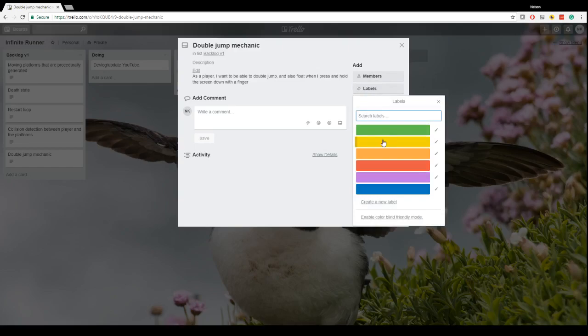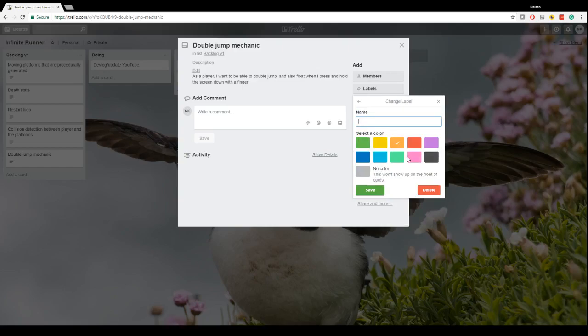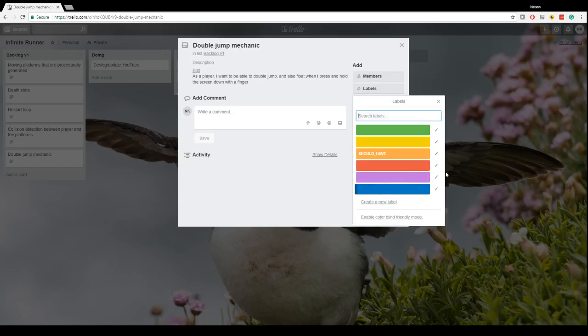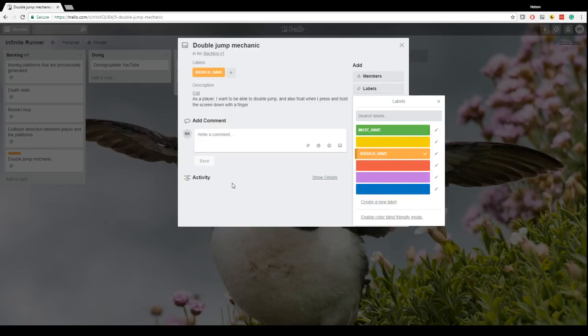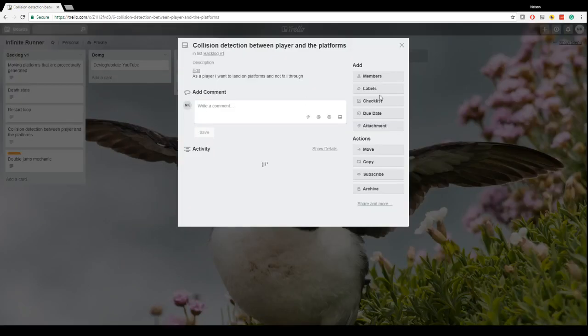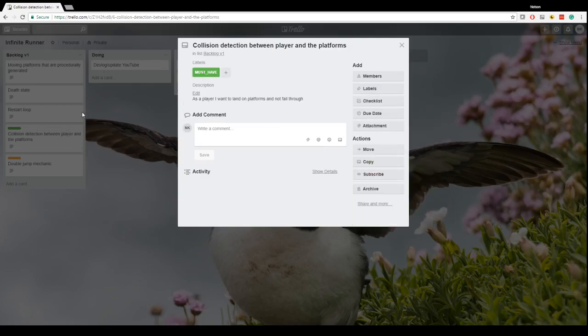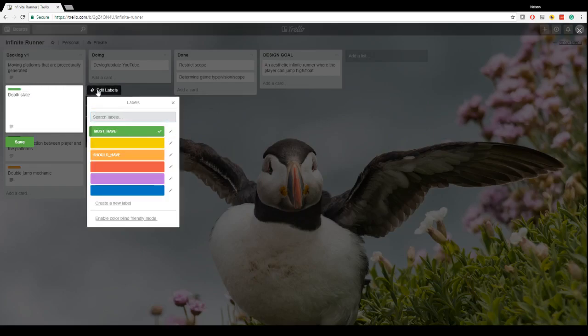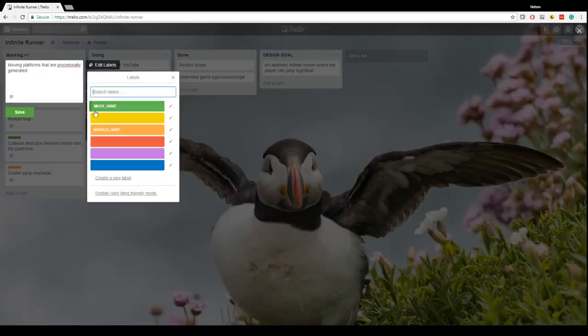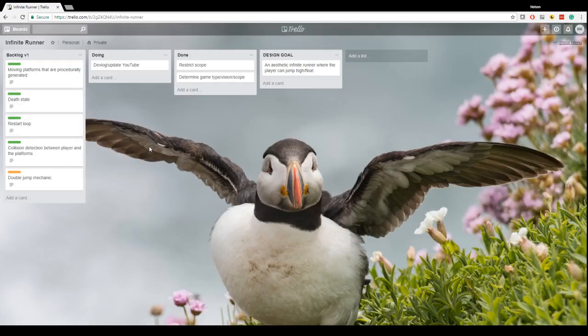I think the minimum viable product is the four tickets above there. Let's go. Must have. So mark that as should have, and these three as must have. I can change these colors around later. Some people go red, orange, green, and this time I'm going green, orange, red. Okay, that's the minimum viable product.